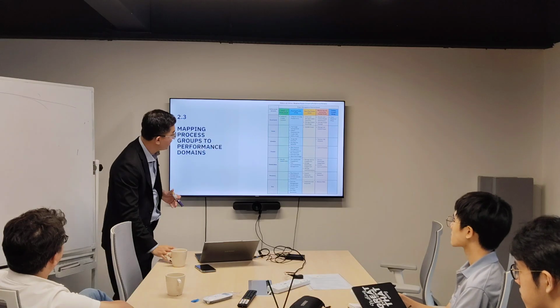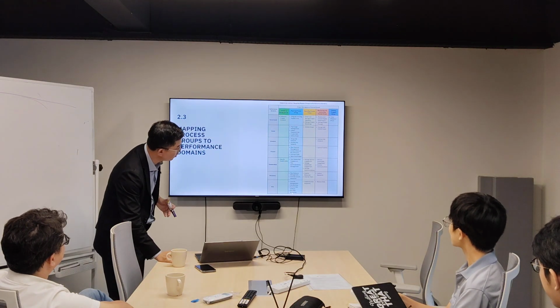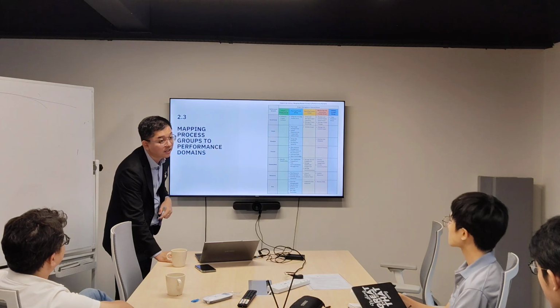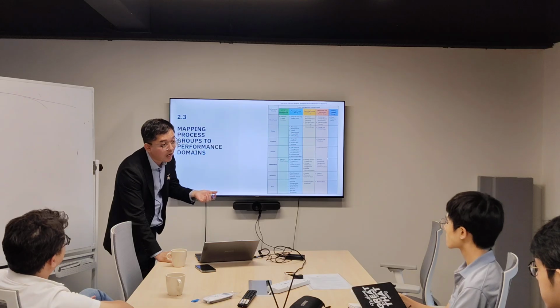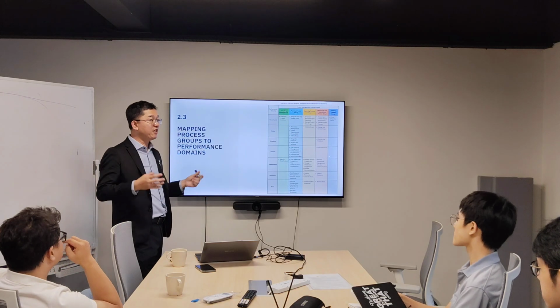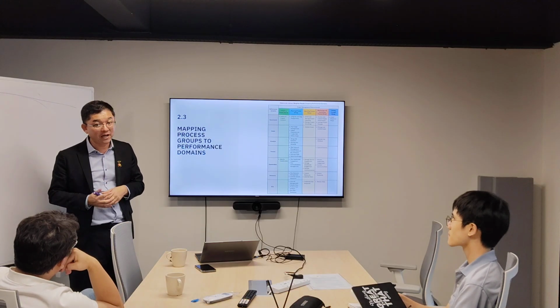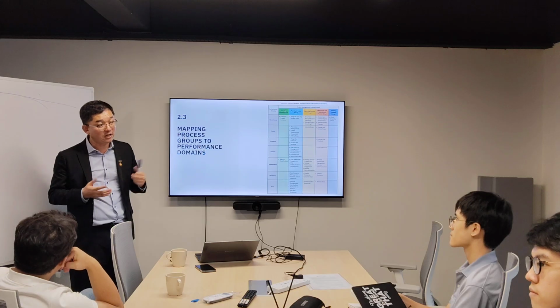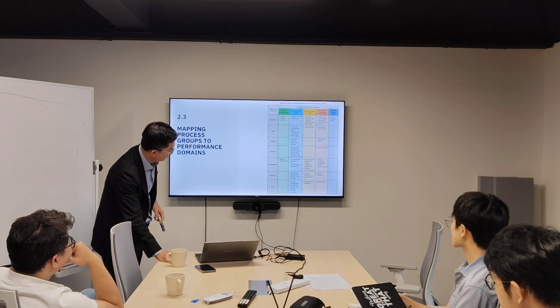So we need to have a backup plan. That's why when you are planning for the risk already, you also need to put it in here. If let's say speaker A in that day is unable to come, who is your backup plan? So when you are planning for 5 speakers, basically you need to have maybe 6 or 7 speakers in your planning. You cannot just have 5 speakers. So this is one of the risks that you need to put in. Okay.